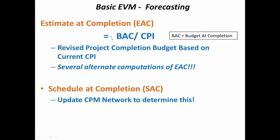This is just one of the formulations for estimated cost at completion. There are several alternate computations based on different assumptions. Here we extrapolate based on current CPI, but in a project things can change — the current cost performance may not hold in the future, so estimated completion is a dynamic aspect that will keep changing.